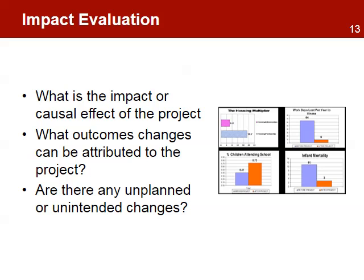Impact evaluations occur long after the completion of the project. Their purpose is to provide information on the impact of the project and its contribution to the final goal. Impact evaluations seek to answer cause-and-effect relationship questions: What is the impact of the project? What changes in outcomes can be attributed to the project? Are there any unplanned or unintended changes?